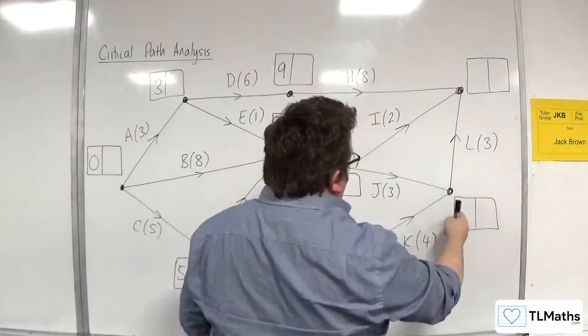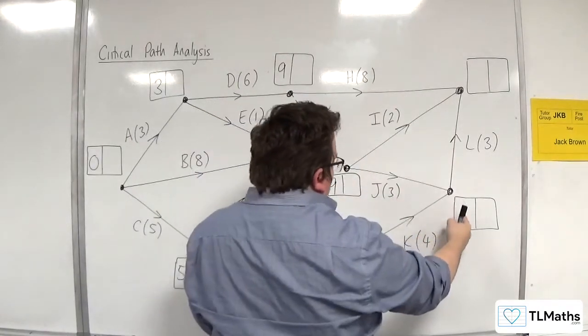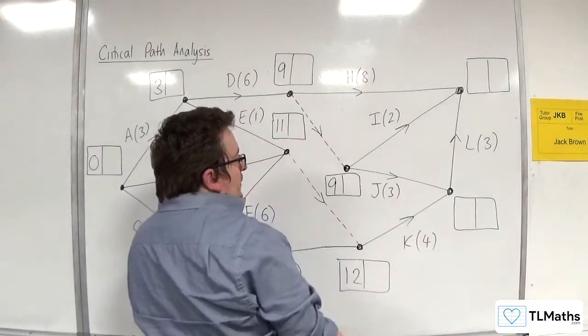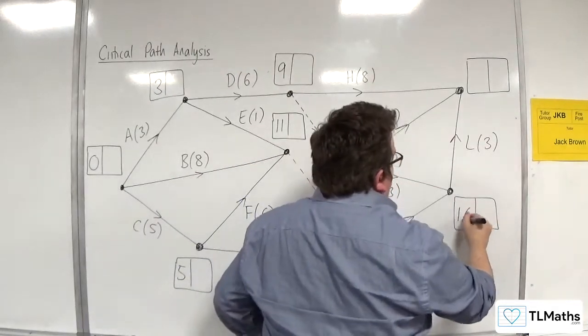Right, now this one. So 9 plus 3 is 12, or 12 plus 4 is 16. So we take the larger, so 16.